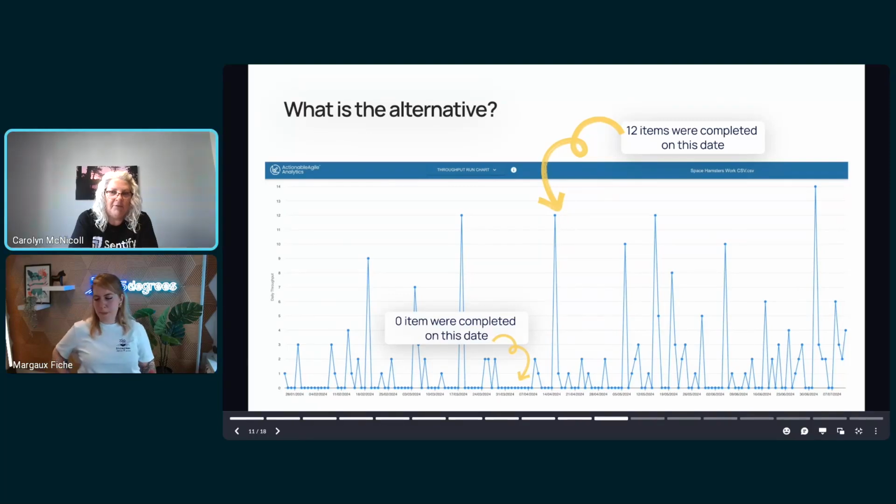I would say if you use the data from your team, your project, whatever data you're pulling in, it's going to show you the history, which means you don't need an estimate anymore. You forecast off that history. So you're looking at, you can hopefully narrow it down to similar work, and it might be over a 3-week or 3-month period. But if you can see how long that work took the team, then you can look at similar work and say, well, we got all of this work done in less than 30 days, so we can surely get it done within 30. And then as you get closer and closer, you can give more accurate, higher confidence forecasts at that point.